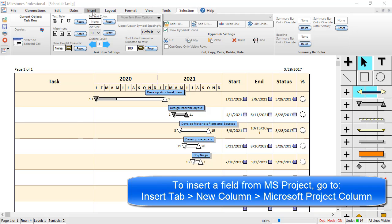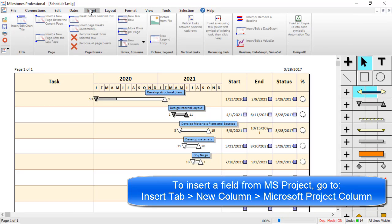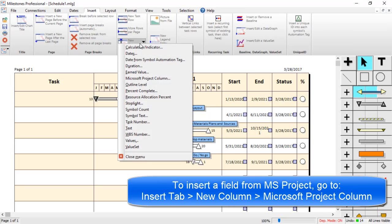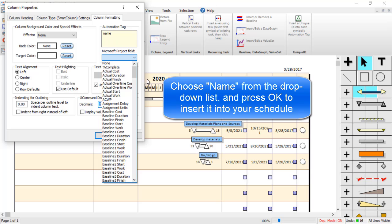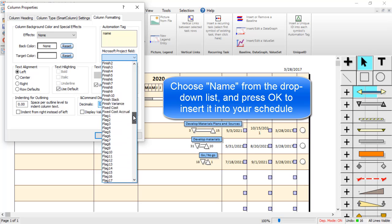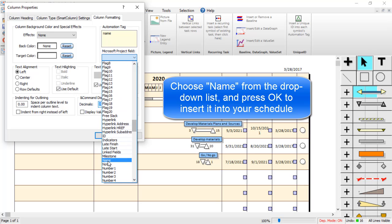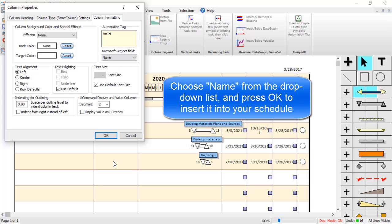Go to the Insert tab. Choose New Column. And choose Microsoft Project Column. In the drop-down, choose the Name field. And then press OK.